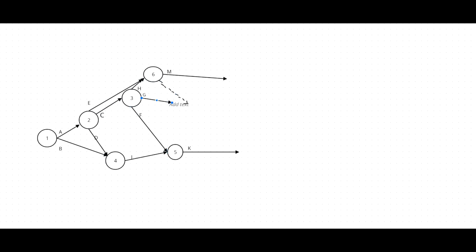EHG, we should take the K here also. Then we can complete all after the 7th event. Then we can start L.